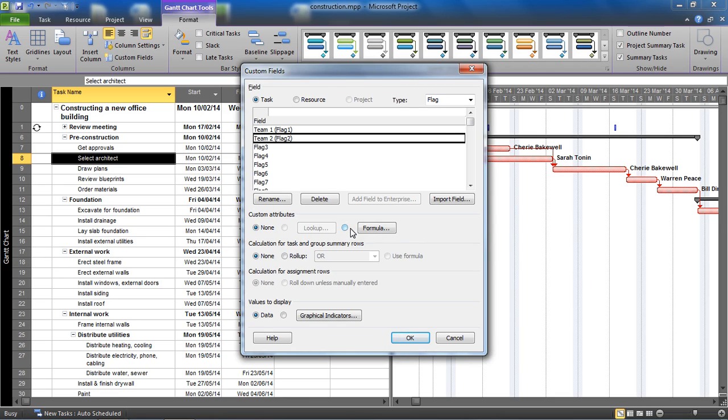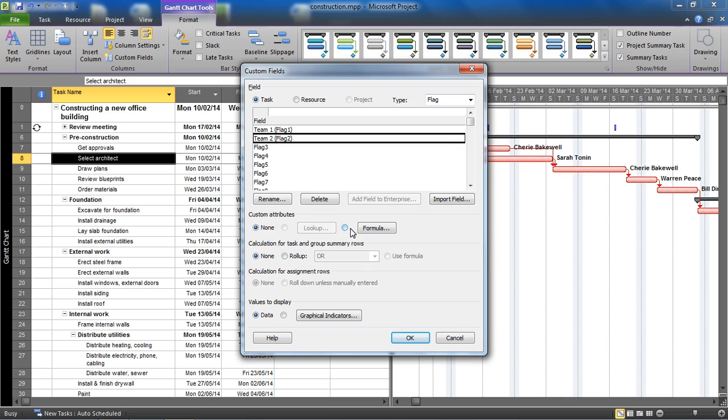What these flag fields are going to do is flag fields just display yes or no, that's all they do. And I want a flag field to be able to display yes if an individual from team one is assigned to that task and no if they're not. And then on the flag two field, the team two field, I want it to say yes if they're from team two and no if they're not, because then we can create bar styles based on the information in the flag.